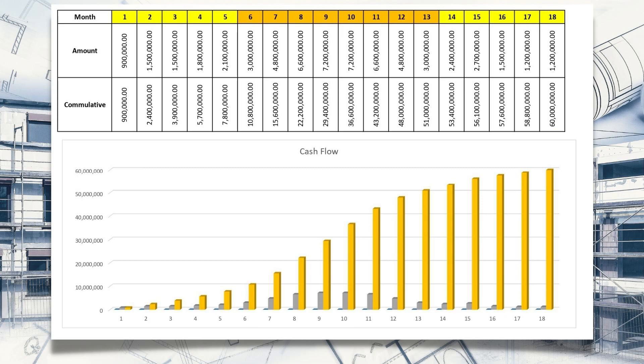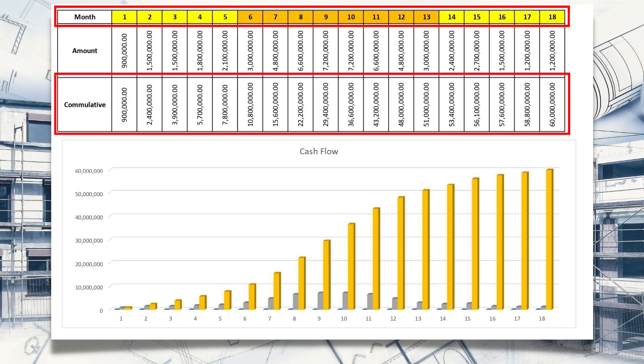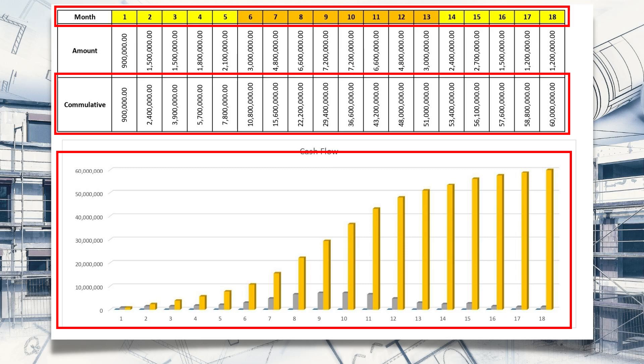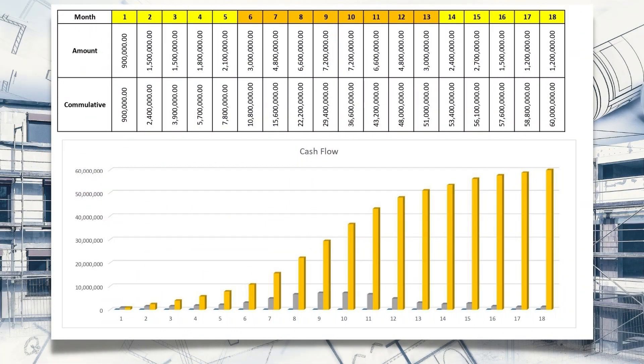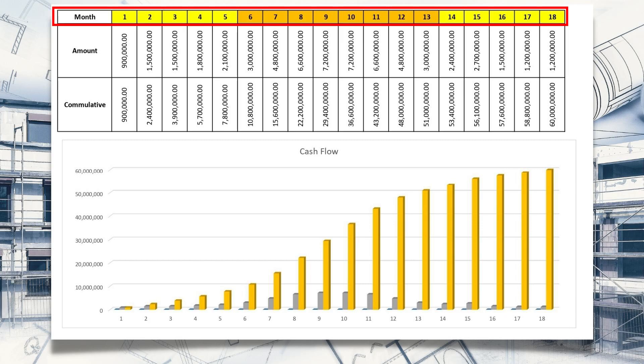When you draw the relationship between the month and the cumulative — as seen by the yellow lines going up from month one through month 18 — you get the S-curve. From month six to month 13 there is a drastic increase in spending, because in that period many activities are happening simultaneously: casting the upper slabs, block work and plaster ongoing below, and finishes and joinery starting on lower floors. That is why the S-curve has its characteristic shape.